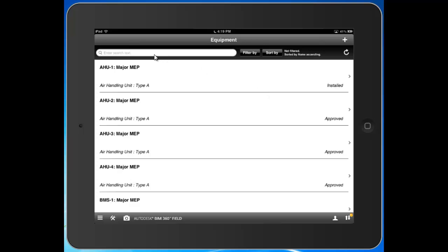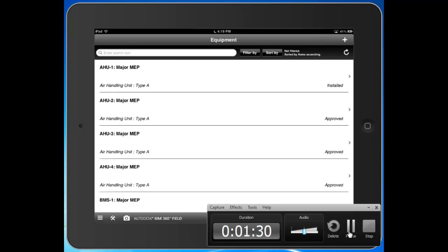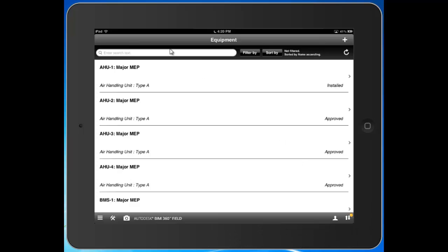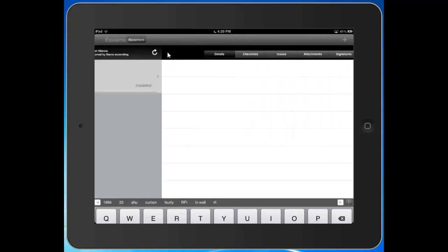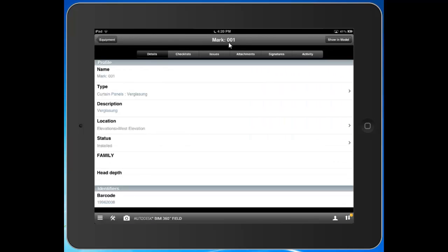So I'm going to go ahead and search for a piece of equipment here. So I'll tap in the search text here. I actually began barcoding my equipment. So part of my workflow was barcode the equipment when it arrives on site. So I can search for it, and here it is. It went ahead and pulled up this equipment record here.